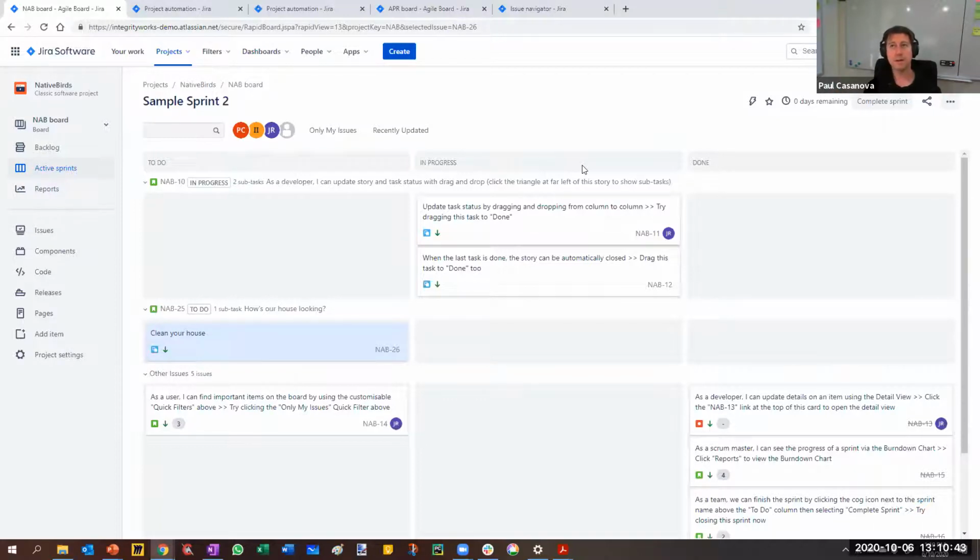She's got another one where deployment tasks are automatically created. For some of our products we need some manual deployments done. So for a story, when you create it, you can run a manual task, which will create a deploy to UAT task, and another one which is deploy to production. And if you move the story from UAT back to in progress, that will create another deployment task automatically.